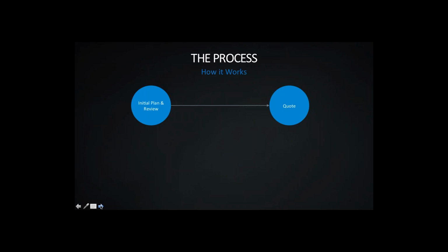The quote will obviously be emailed to the customer. The mission planning is an important element, and it's not just planning the flight itself. That's one component, but authorizations and having an area to launch and retrieve the drone is critical. Also, if there's other authorizations where you may be closer to other people that are not part of the mission, you may need to put up some signage, and there's a few details like that that are important for denser areas, for instance. We have to notify the FAA of all flights and a few other hurdles administratively.